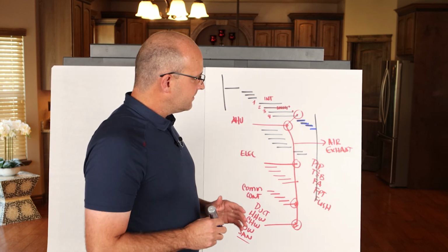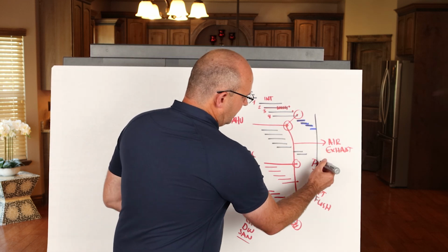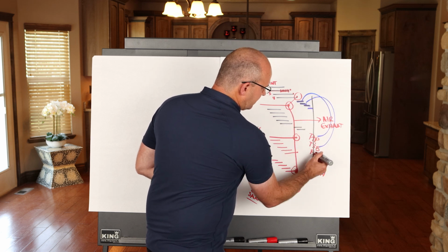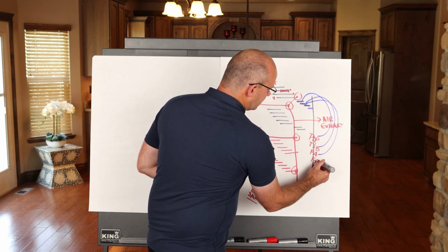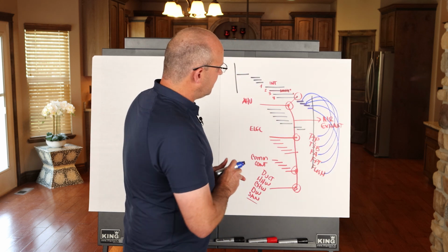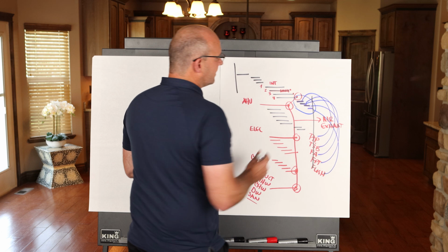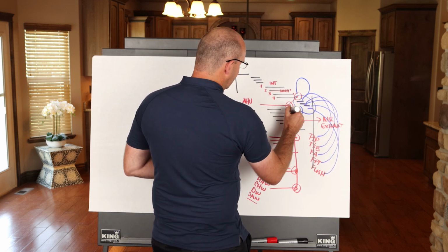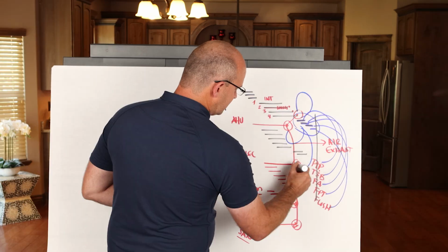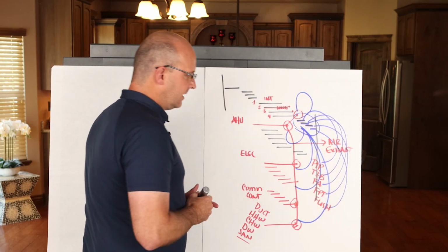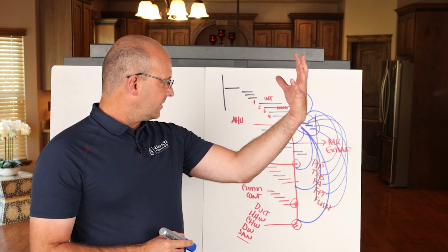The point that I'm attempting to make is that yes, your overall point-to-point should be looped in, your test and balance should be looped in, fire alarm integration, functional performance testing, and building flush. So that's all going to end up here. But what I want to make clear is that this is tied to the individual floors, it's tied to your air handlers, it's tied to power, it's tied to your comms and internet, and it's tied to all of that infrastructure coming up the building.